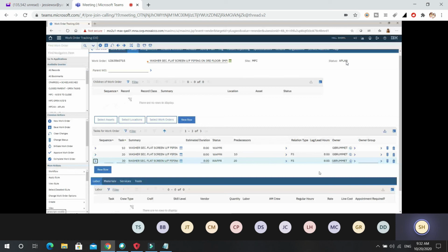And I know Mike typically has work orders that might be 5 days, but there would not be any lag between them. They would be doing like Monday through Friday. They would all just be a finish to start. Right. But there are some days, because we have repair days usually on Tuesday. So there are days that Tuesday we're wrapped up, but we're working on it Monday and then start back on it on Wednesday. So right. Yeah, that's nice to know. Thank you.